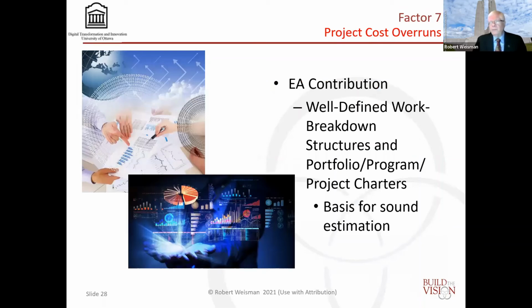Project cost overruns. One of the major problems is that, having been in civil engineering, yes, you do have cost overruns, but fewer of them, and the estimation process is much more rigorous. I find in the IT field, generally speaking, because there's not a definitive work breakdown structure, getting to a decent cost estimate, be it class A, B, or C, or whatever you're using within your organization, is extremely difficult. So often these cost estimates are way under budget. And yes, requirements tend to morph over time.